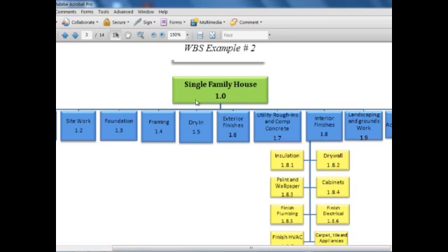You need to understand that you can break down the work, somehow grouping it together to manage it better. And if you go back to P3 and SureTrack Project Manager, most of you use the activity code to do that. Now with Oracle Primavera P6, it gives us an opportunity to manage it by the WBS. If you are into earned value management, this will be very helpful.